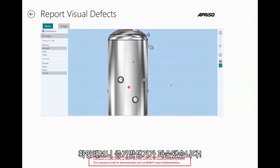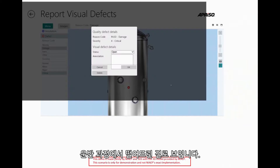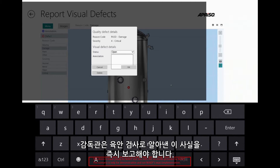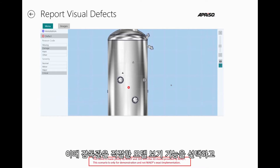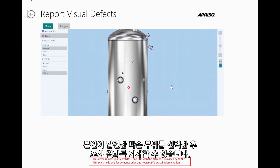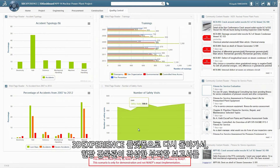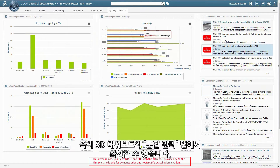I found damages on the SG. Probably this SG was dropped during transport. I should immediately report my findings from my visual inspection. I select an appropriate view of the model, pick the point where I found the damage, and describe the finding. It will now be noted on the 3D dashboard. Back to the 3DEXPERIENCE platform, the non-conformance report issued by the inspector in the field is immediately available in the 3D dashboard quality control tab.